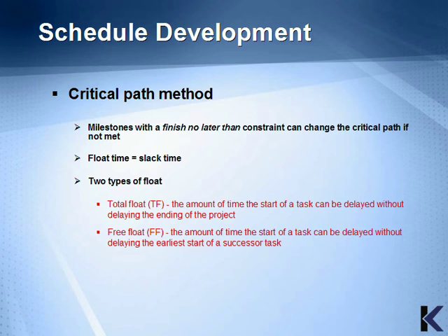Float time is the same as slack time, and there are two types of float. The first is total float, which is the amount of time the start of a task can be delayed without delaying the ending of the project. And free float. This is the amount of time the start of a task can be delayed without delaying the earliest start of a successor task.